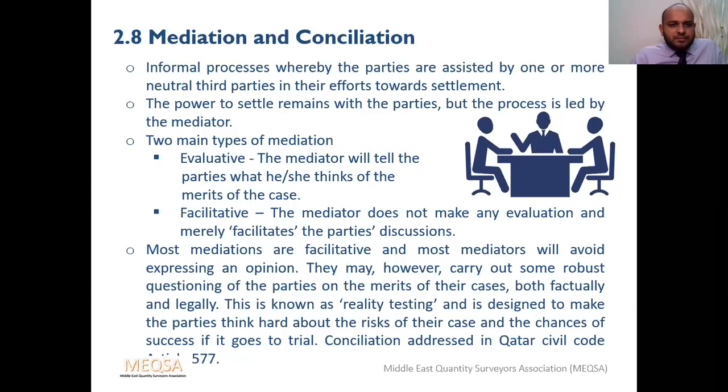So, mediation is a process. There will be a mediator. He will be facilitating by talking to each party separately, and he will try to bring the gap very low or reduce the gap. At the same time, he will encourage them. He will talk about the consequences of these issues, and if it is settled, how things will move forward. Such things will be done by him.